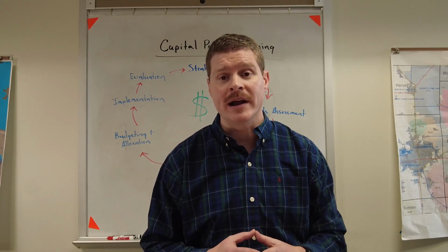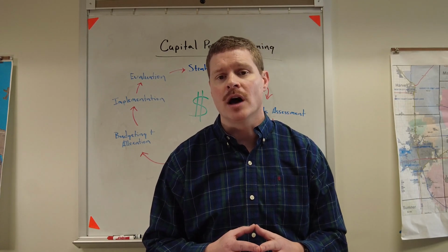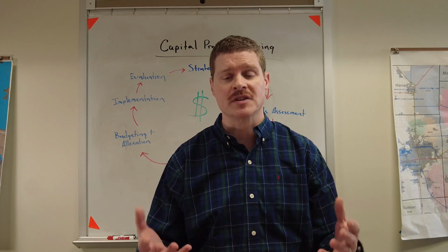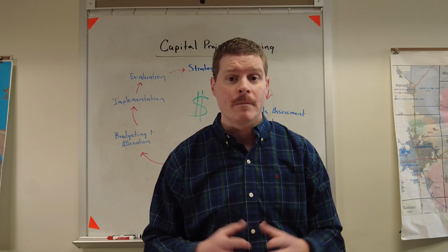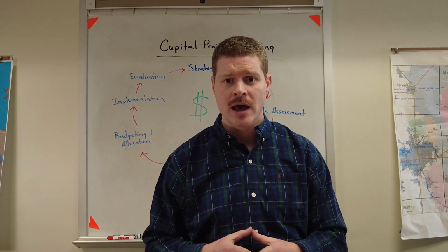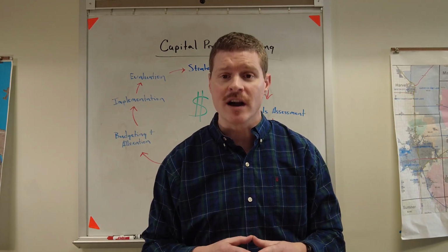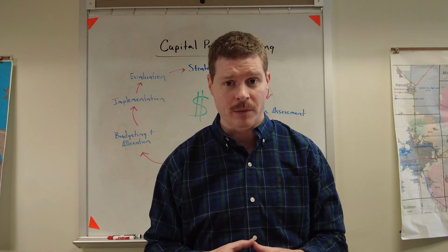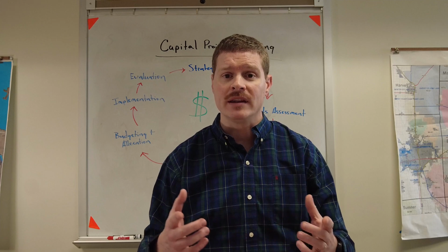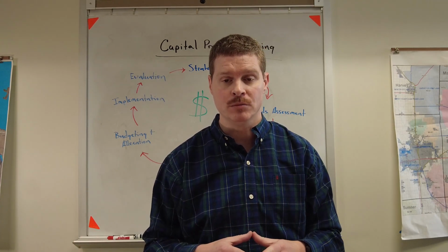So for example, we might need to study some options to determine how we would best serve that area, not only from a water pressure standpoint, but also for fire flow and just general serviceability standards. By doing so, we now determine that we need to invest in a booster pump station that will provide the needed pressure to serve the area, as well as the fire flows needed for that residential development. Now we can begin to put that into the capital plan so that we can then make sure that that happens when that growth comes to our community.